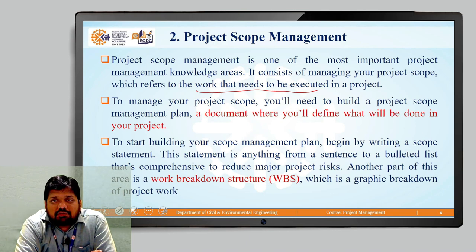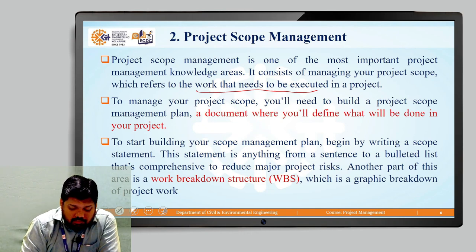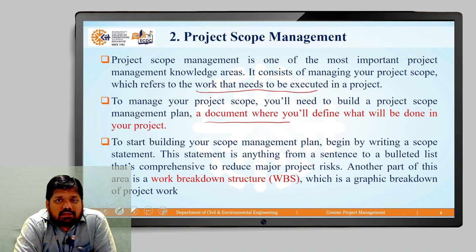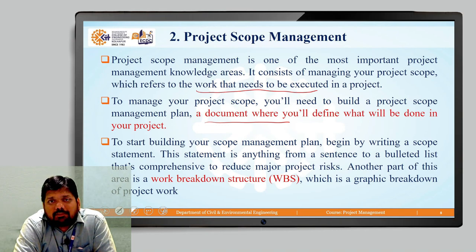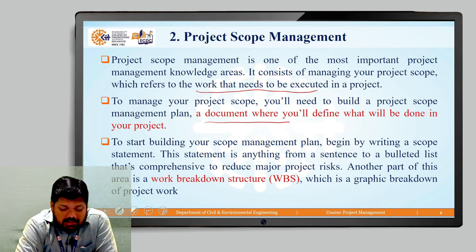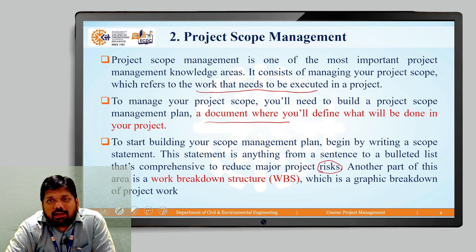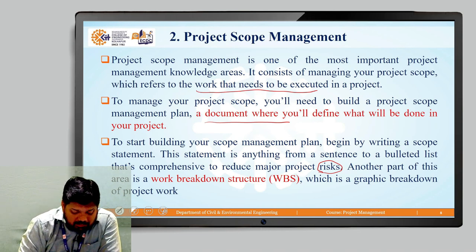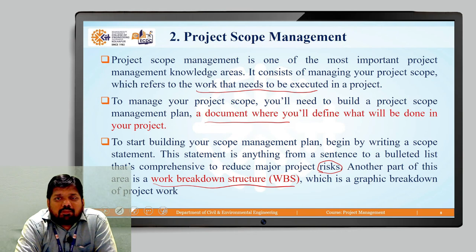To manage your project scope, you will need to build a project scope management plan — a document where you will define what will be done in your project. To start building your scope management plan, you have to begin by writing the scope statement. This statement can range from a sentence to a bullet list that is comprehensive enough to reduce major project risks. Another part of this area is the Work Breakdown Structure (WBS), which is a graphic breakdown of project work.